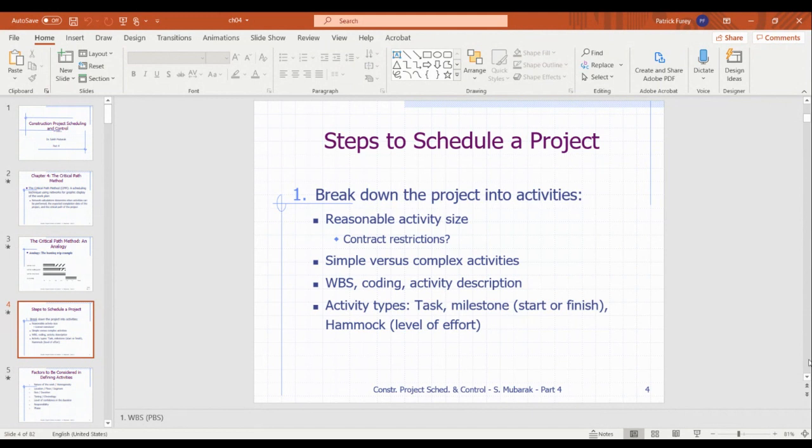Anytime you do a project, you touch an area, even if you don't touch certain components in that area, if you're working in that area, people are going to assume whatever happens is related to the construction. So maybe there's an exhaust fan serving a lab hood that I'm not touching, but I'm building out all the office space on the other part of the lab. Well, when that exhaust fan conks out, and nobody knows why, they're going to try to assign the responsibility for getting that fan back up to the contractor. So that warranty period does really start to make a difference.